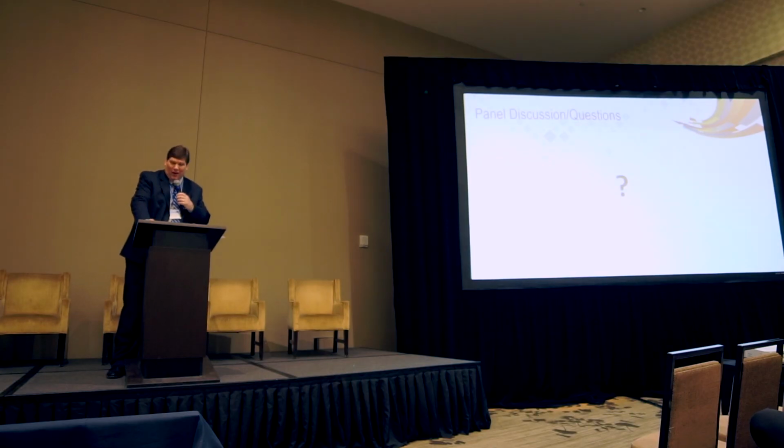Hi, I have two. What's the maximum allowable fee we're allowed, and should we propose travel or not? It depends. I'll discuss travel first. For Phase Ones, both SBIRs and STTRs, travel is discouraged, so we're going to have to get approval for travel for Phase One. For Phase Twos, you've got a longer period of time, two years, and so if you need to travel and meet with the Corps at the center or meet with your subcontractor, we would understand.